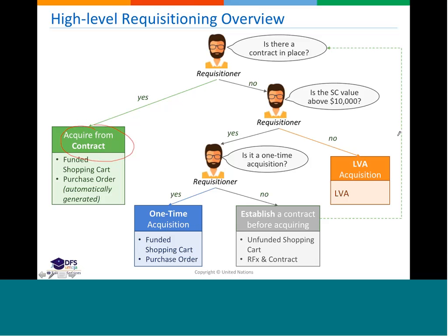So, in other words, do not specify the WBS on the shopping cart for this case. Exactly, yes. In the unfunded shopping cart, we will not specify the WBS. It's just a formal request for procurement. We will specify it in a second shopping cart, and not in all the cases. Most of the items will be stored in the inventory.